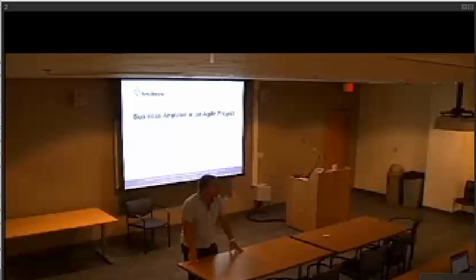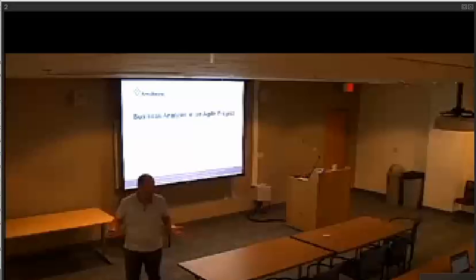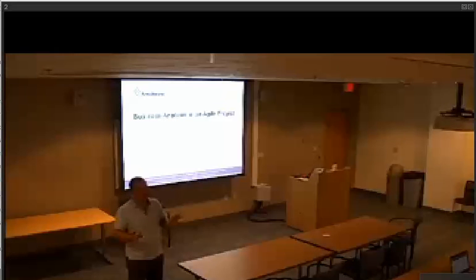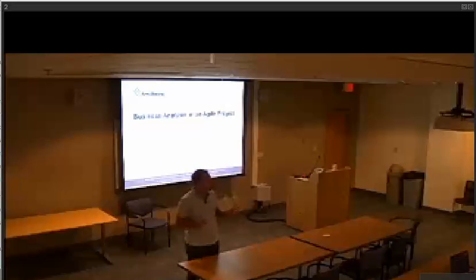What I was thinking about is we're behind on time. We've got to get the thing done faster. So, well, why don't we just go add more people? Right? And we know exactly what the outcome is. And by the way, we've known about this outcome now for about 60 years. Notice, and my apologies to other project managers, what do many project managers still do after 60 years of knowledge? They add more people, which accomplishes exactly the opposite of what you're trying to do.